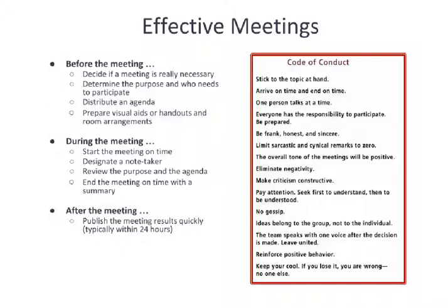So once you've determined if a meeting is really necessary, then move on and determine the purpose of the meeting, who needs to be at the meeting, and clearly set an agenda for the meeting so that time can be used efficiently and productively. That may require that you prepare materials in advance.